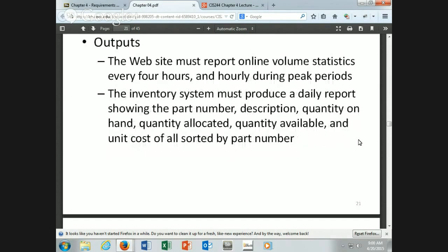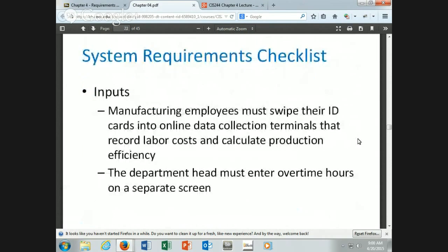As soon as we know we're going to manufacture a product, we should be going and allocating whatever parts are needed from inventory, right? Because we know certain parts have a longer lead time. If we have a machine shop that's very busy that's given us a lead time of 60 days, we don't want to be in that process waiting for that part on day 30. Then we've got 30 days for something to sit there till we can put a part on it.